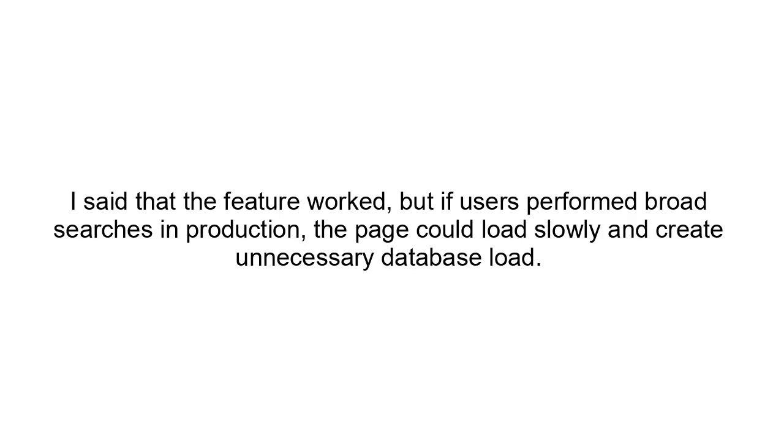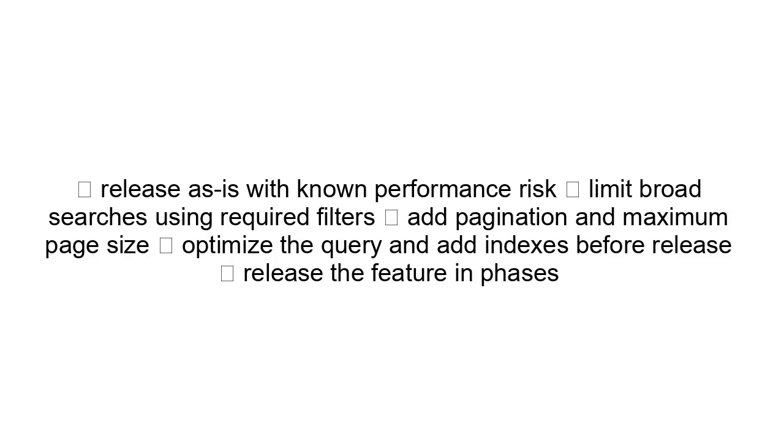I said that the feature worked, but if users performed broad searches in production, the page could load slowly and create unnecessary database load. I presented options: release as is with known performance risk, limit broad searches using required filters, add pagination and maximum page size, optimize the query and add indexes before release, or release the feature in phases.